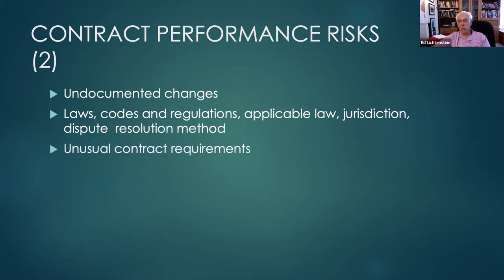Unusual contract requirements. If you're being asked to do something you don't normally do, be careful and make sure you've provided for unanticipated conditions, unanticipated holdups. You need to know them and provide for them. Is it going to cost you extra money? Is it going to cost you extra time? Is it going to require some skills or new equipment that you hadn't bought? And that equipment may take some time to get there. Make sure that you can meet those unusual contract requirements.